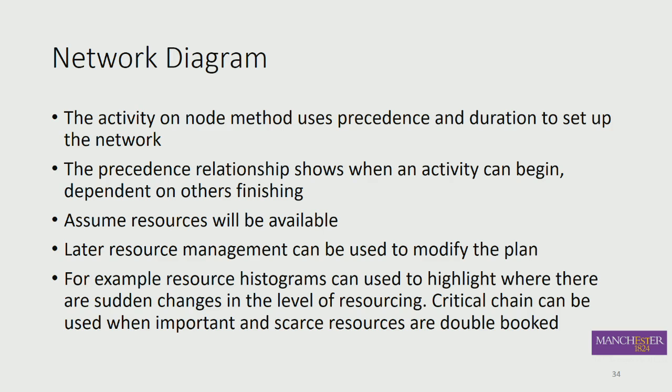It's quite a complex task. Then after the duration estimates, the duration estimate has an assumption that the resources are available. So I'm assuming at the duration estimation stage that I have any resources available, and I'm going to use them at a reasonable consumption rate. Perhaps normal consumption rates of resources, but it's an assumption. Then once we finish the network, we go on to resource management. We think about the resource implications of that, which is the last bit we do today.